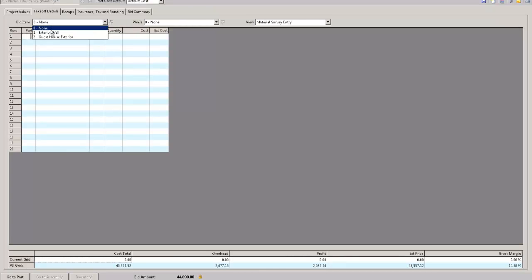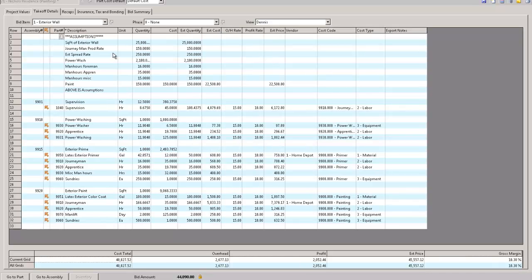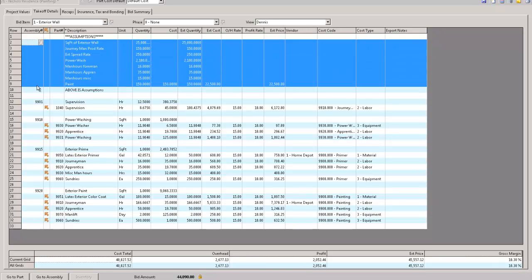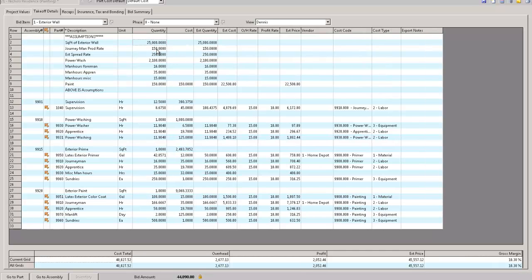I'm just going to do a dumb example, but you'll get the idea. Full blown estimating looks like Excel, feels like Excel. It's not, it's our own estimating system. Up here are a whole bunch of assumptions. Let's open this up. How many square feet can a production journeyman paint in an hour? How many square feet does a gallon of paint cover? How many square feet can I wash? Some man hours in here, and my paint, whatever. So, variables.